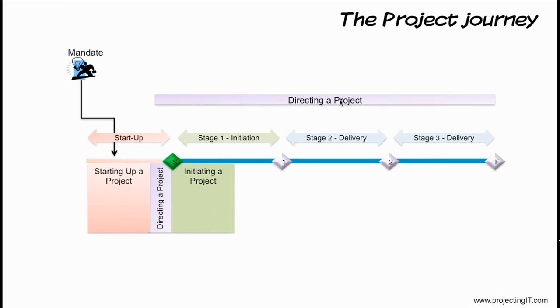As part of planning, the project manager plans for the detailed requirements, the list of deliverables, the scope of the project, and then identifies the resources required to do the work. The efforts at a high level are determined and the budgets are also identified. Apart from that, the project manager will determine the risks that will affect the project objectives and what we can do about them. A risk register is created to describe all the risks and the mitigation actions.